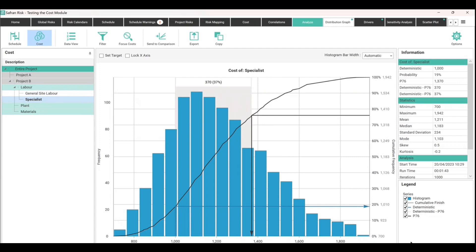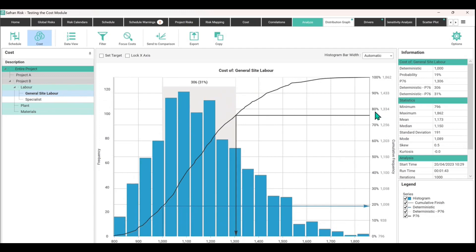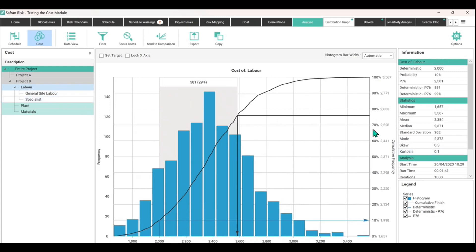Just remember when you're looking at the drill down of these things and if you're starting to get interested in confidence intervals, which is this 0 percent to 100 percent, i.e. the confidence of achieving a particular cost or particular price on a particular element, remember that you can't sum total, say the P80 of the specialists and add it to the P80 of the site labor and then expect those two things to equal the same sum together P80 on the labor.